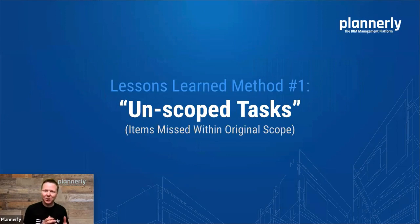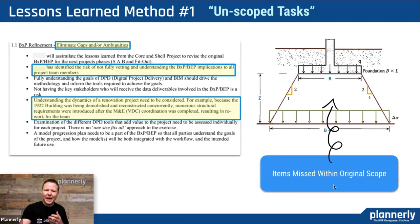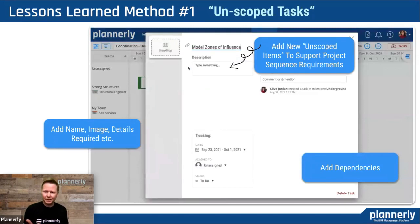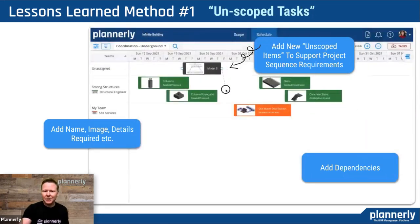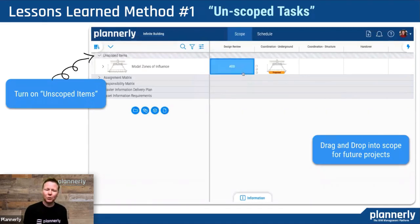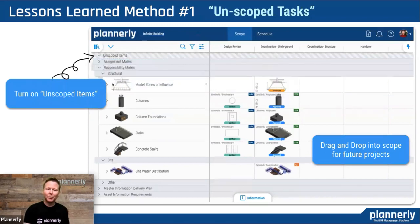Method number one: when you create a scope and you think you've thought of everything, but actually you missed some things in the original scope that came up later on in the project. These gaps or ambiguity are a real opportunity to learn for the next project. For example, the underground services team says, 'I need the zone of influence under the foundations in order to coordinate my underground services.' In capturing that data, the underground services team adds this 'model zones of influence' item, simply drags a photograph in, adds the details required, and adds any dependencies between that task and their task. The team is able to turn on this set of unscoped items and then see — maybe in a future project, we should think about this item. By dragging and dropping it into a project, we can use it as a template for future projects. So it closes out that loop.